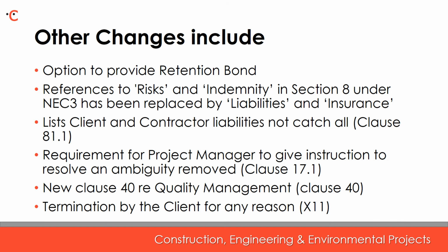The terms risks and indemnity in section 8 under NEC3 has been changed to liabilities and insurance. This change has come about because, firstly, risk has a different meaning ascribed to it elsewhere in the suite of contracts, and secondly, the term indemnity is not well understood outside the United Kingdom. This is a response to concerns by insurance experts and the industry for the NEC to clarify the intent of Section 8. In NEC3, it provided that the contractor's risks were all those that were not the employer risks, so effectively a catch-all provision. This has been changed in NEC4, so the contractor's risks are identified in Clause 81.1.